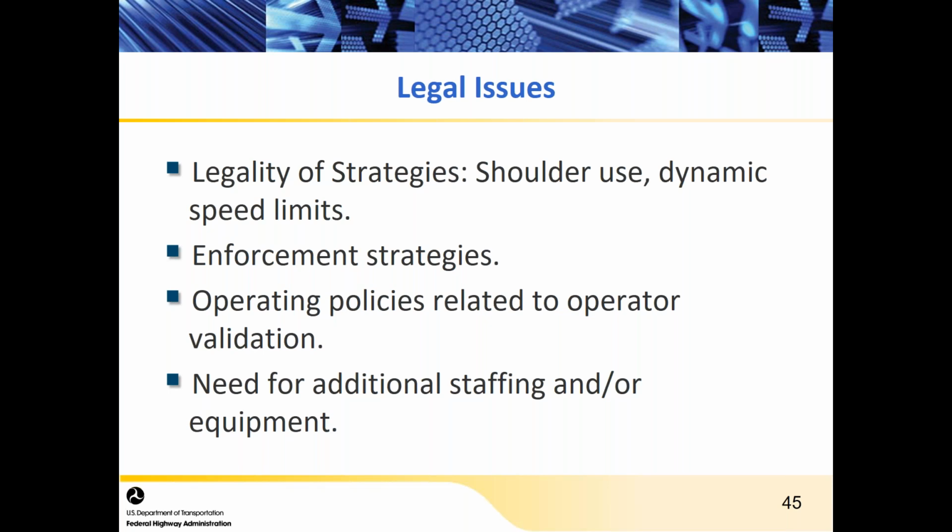But if enforcement is going to be involved in a strategy, you need to make sure that law enforcement is in the conversation early and often so that they don't get blindsided when the system goes live. There are important policies to look at in terms of validation of the system, working with your operators to make sure that you have policies and procedures in place so that when the system goes live, you know how to manage it, and the operator's prepared for different scenarios that might occur.